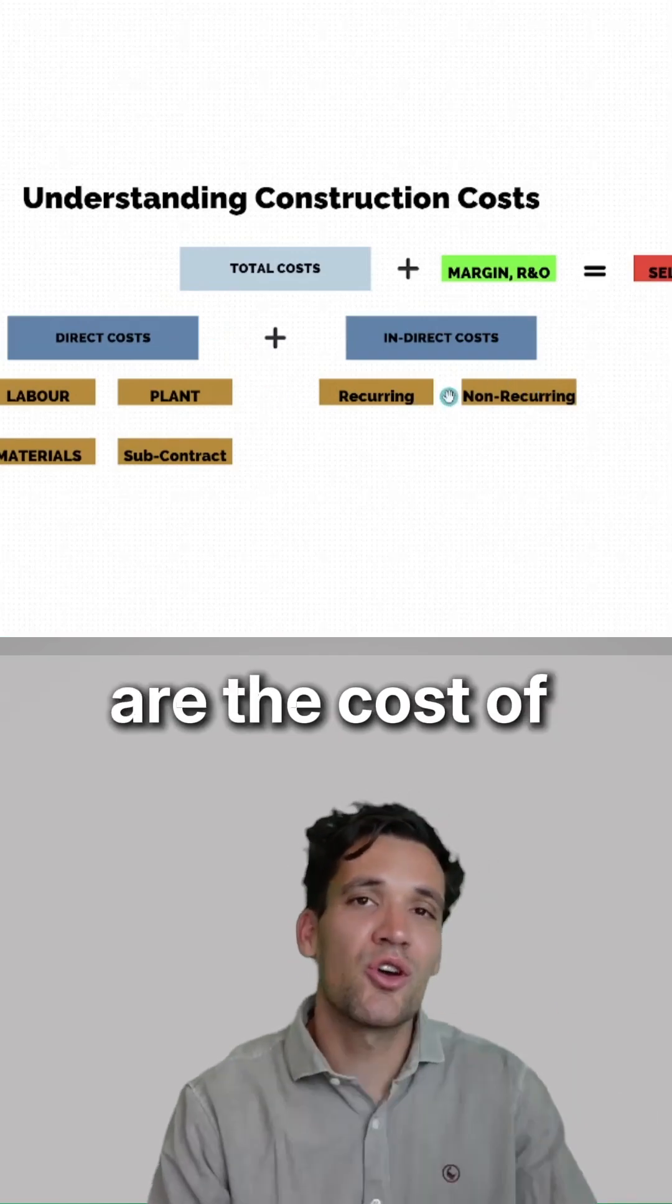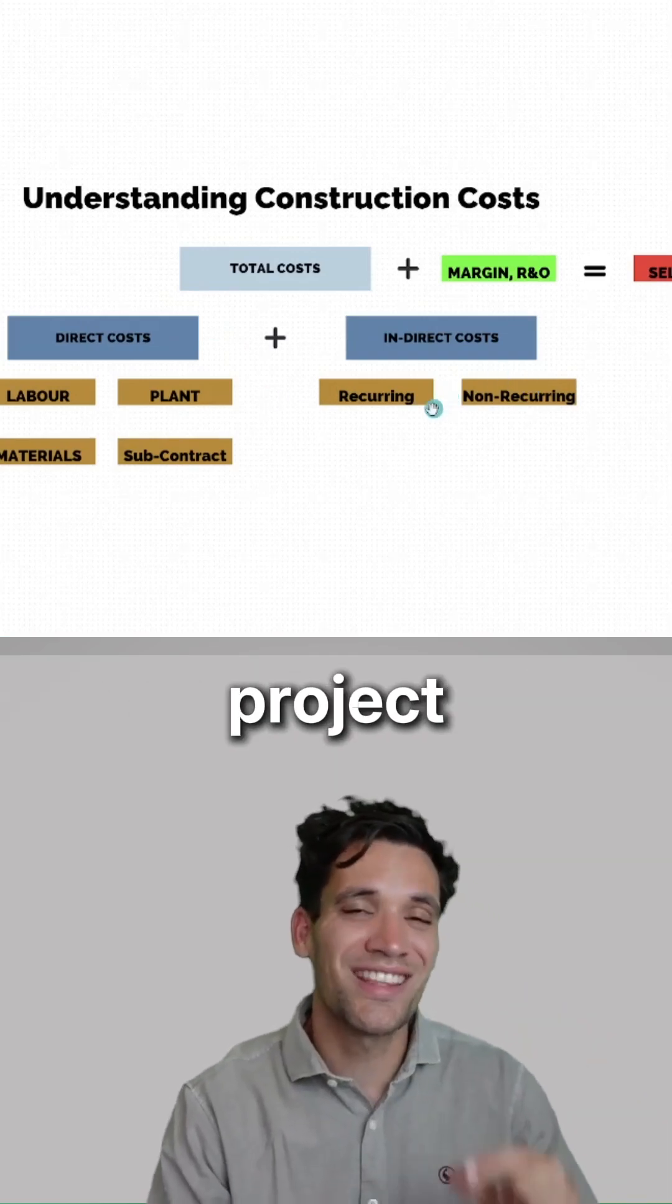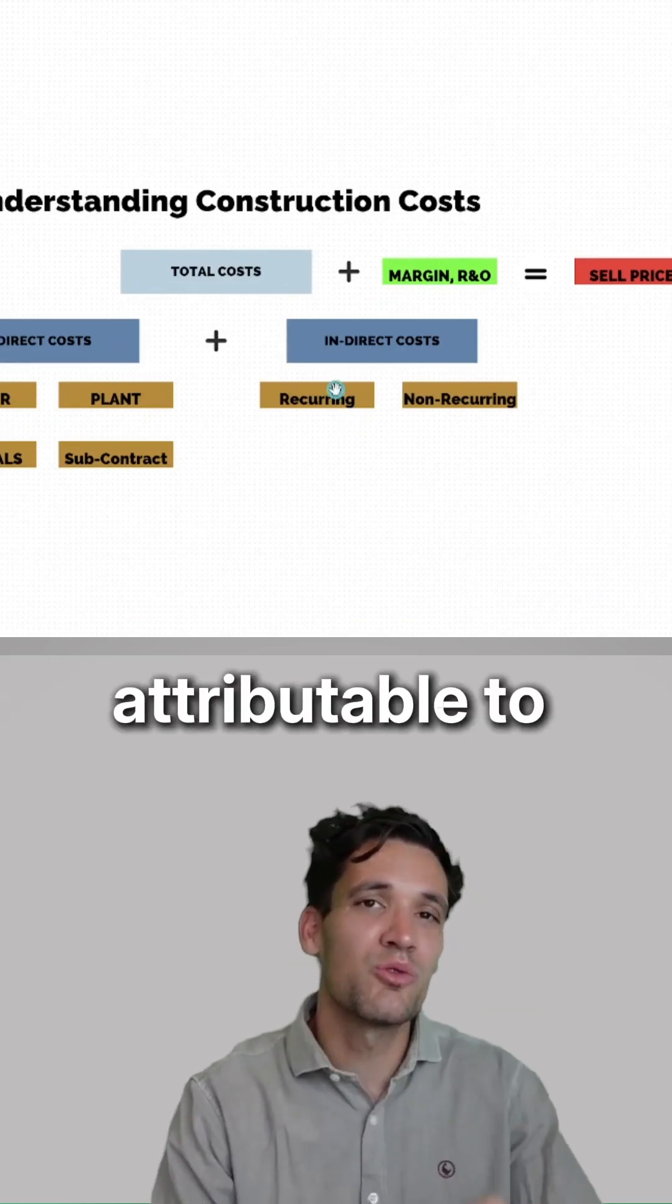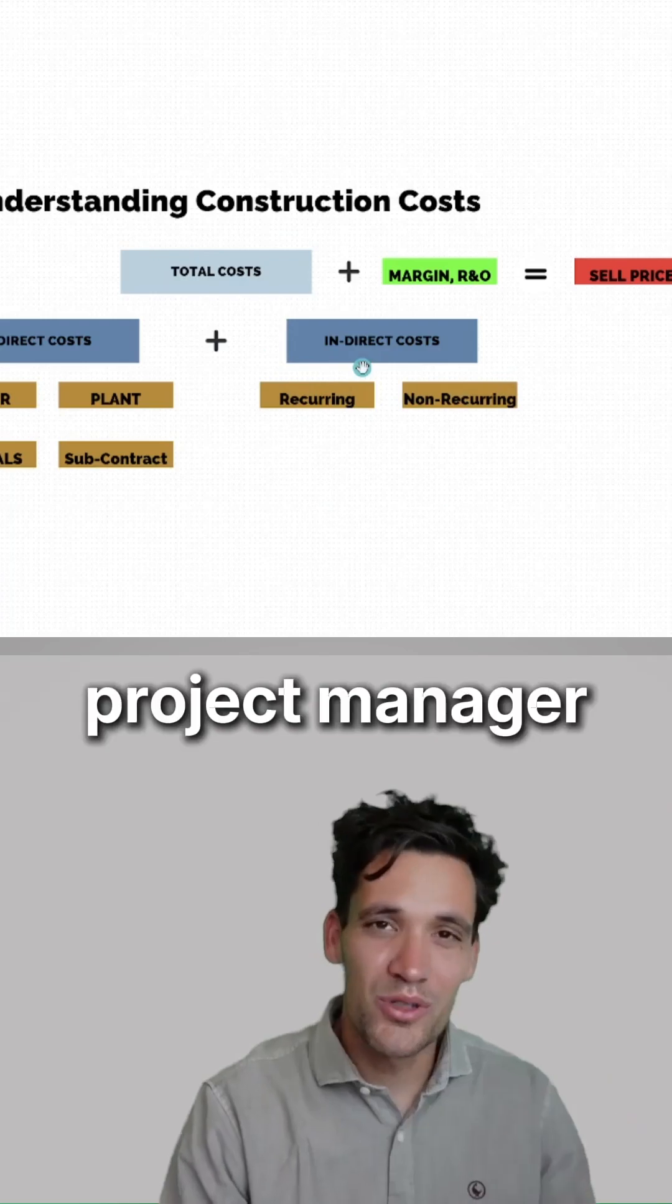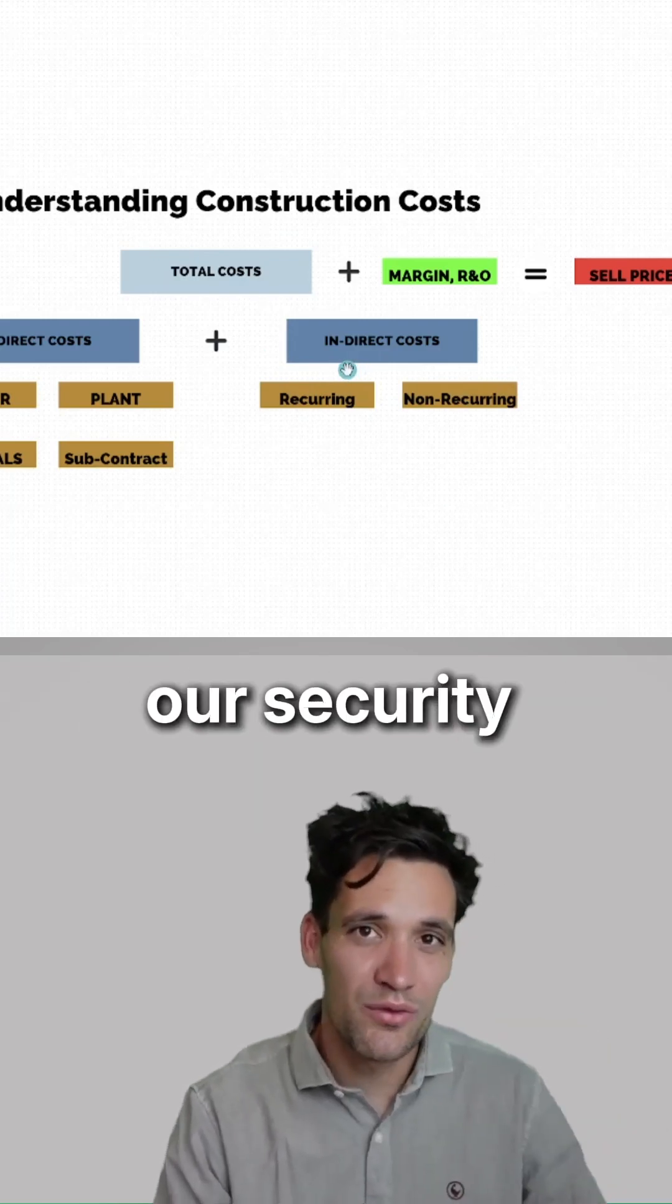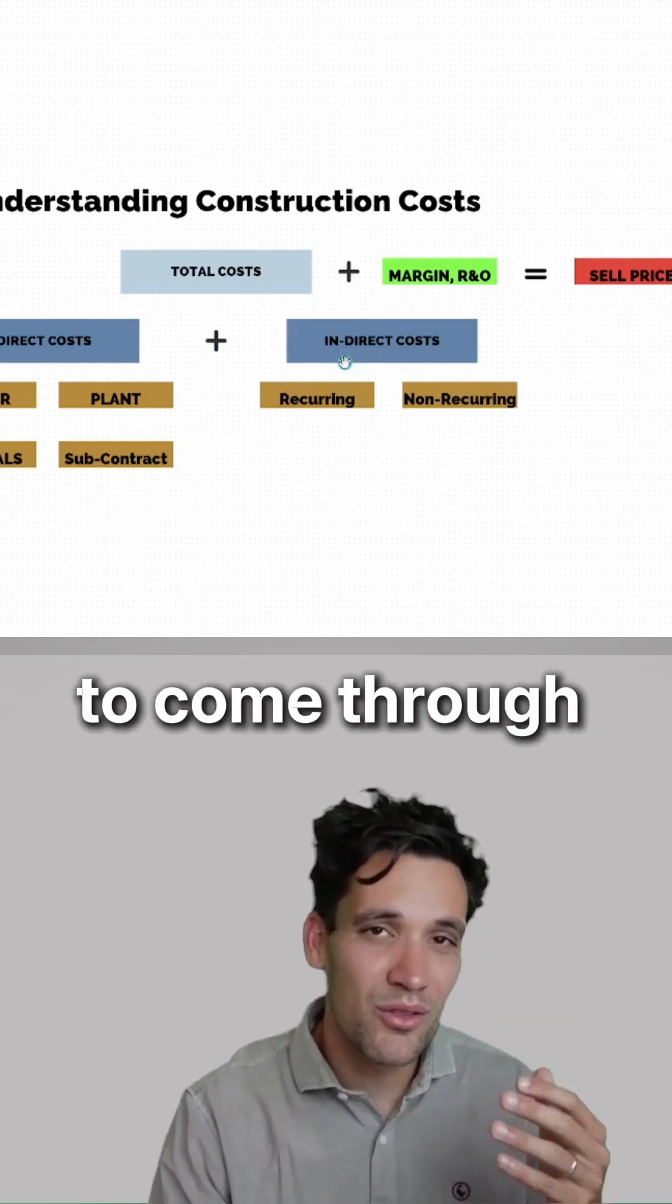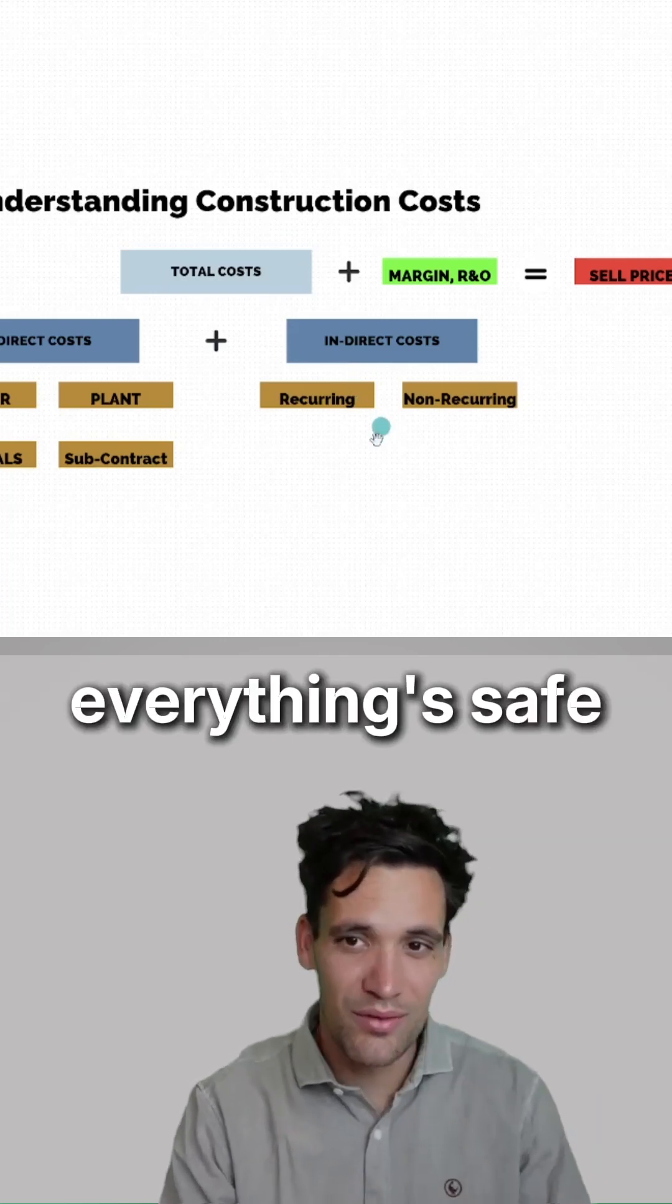Our indirect costs are the costs of running the construction project that aren't directly attributable to any specific part of the finished product. These are going to be things like our project manager salary, our security fencing, or security guard to come through the construction project at night and check everything's set.